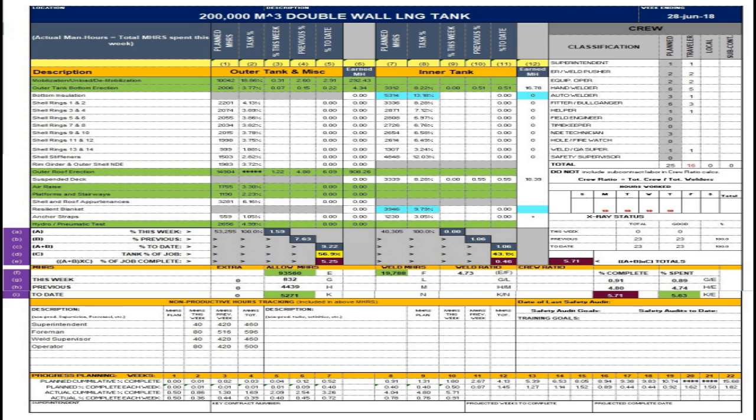Row I. Percent complete to date, that equal 5.71%, represents the percentage of project completed by to-date job performance. Percent spent to date, that equal 5.63%, represents the percent spent on site to date by job performance. Next section, Crew Report, as is shown in the chart at the above right corner. Next section, Non-Productive Hours Tracking, included in above man-hours.